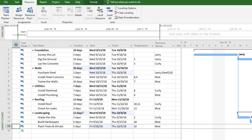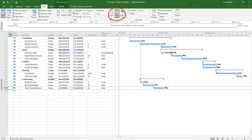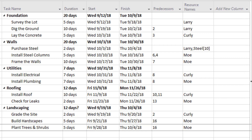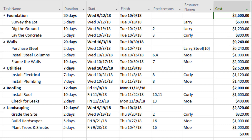Leveling resources will adjust and address those over-allocations. Now that I've made several resource adjustments, I want to adjust the Gantt chart view so I can see the entire project. I'll go to the View menu and click Entire Project. The next step is where a little bit of magic happens — now that we've defined activities, durations, predecessors, and assigned resources, we can figure out the cost estimate for our project. I'll move the separator to the right and add the cost column by typing in cost and selecting it. Microsoft Project then calculates the estimate based on duration of activities and the cost of resources assigned, rolling up those costs to each category.